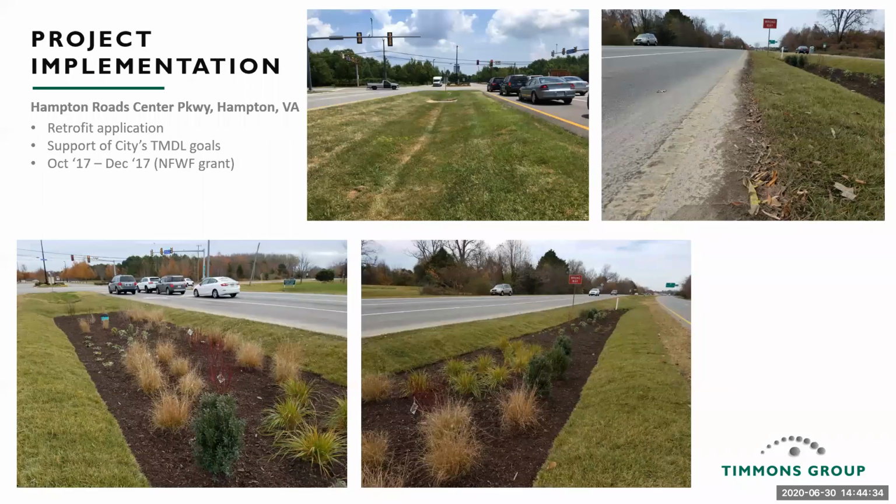Another application that was constructed in the city of Hampton, the Hampton Roads Center Parkway project. This was a beautification project constructed through a NFWF grant, and was intended to go towards meeting the city's water quality credit and city's TMDL goals. This project actually was a quick hitter, but from the time we got notice to proceed in October of '17, the project was completed in December of '17. So just 2 months from notice to proceed to finish, using the city's on-call contractor.